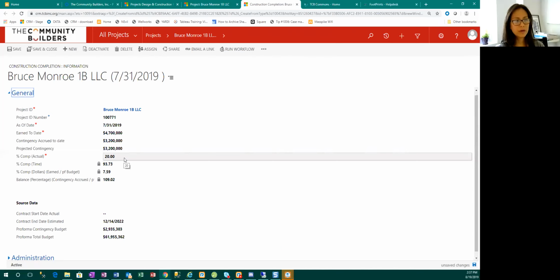Sorry, Jeff, let me just test my understanding on that. If I have a reference in this scenario that the earn to date is 4,700 or 4.7, and I have a pay app in hand that says it's 2.4, or 2.35, it will auto calculate on the pay app 50% complete, right? That's what they're saying to us. They're billing half of the job. That's right. But here you want me to say, oh no, contractor, I don't think you're 50% complete. Somehow I feel like you're only 20% complete. That's correct. And I'm going to put in my opinion here. And if I think they're right, then it's going to be 50.